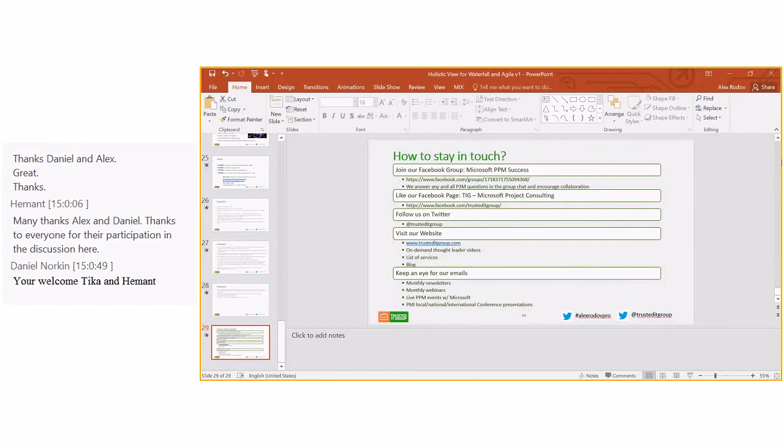They will not just tell you the number, they will tell you why, what this number is combined of. They will tell you this number is XYZ for the project, which is the budget. It means that we're going to have 3 different teams working through 5 different sprints. And this is how the budget comes up.